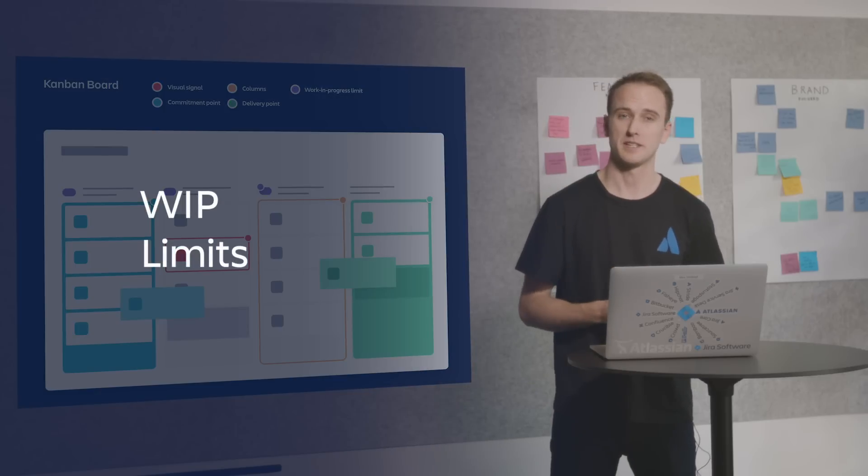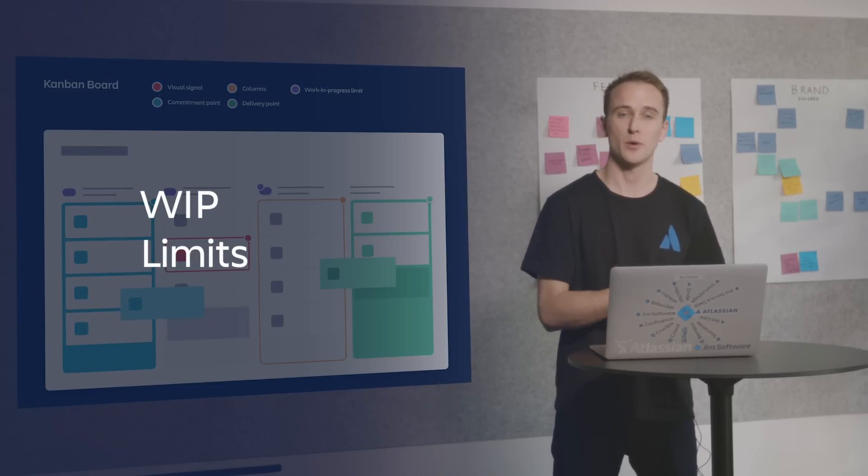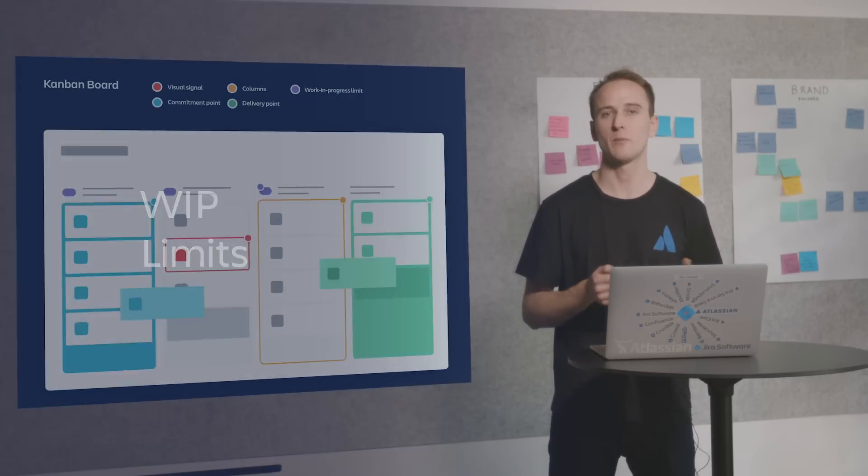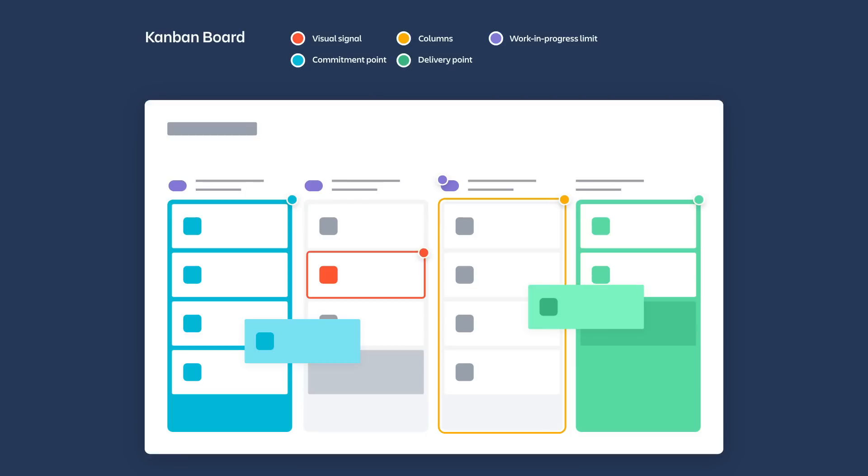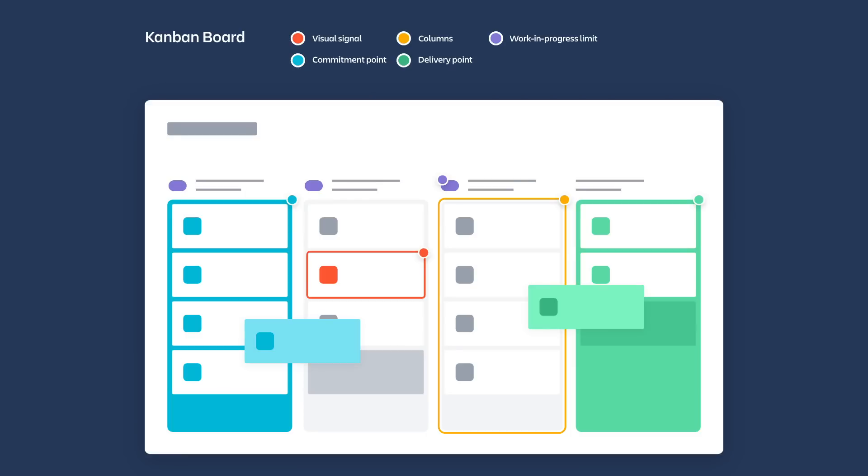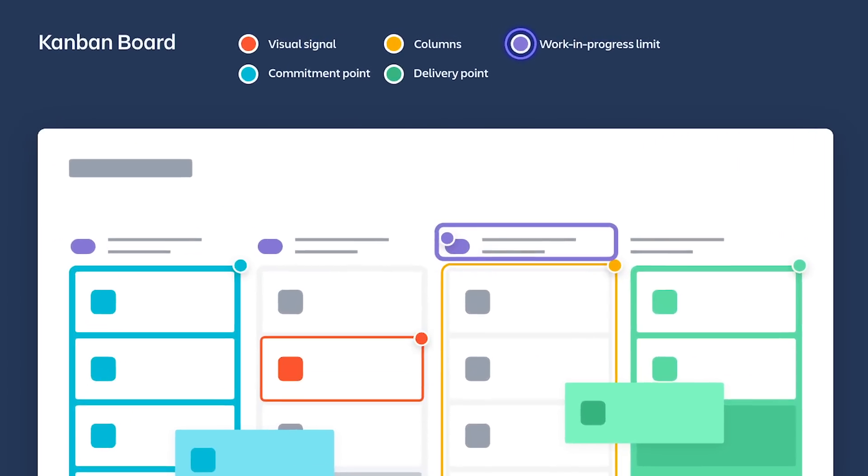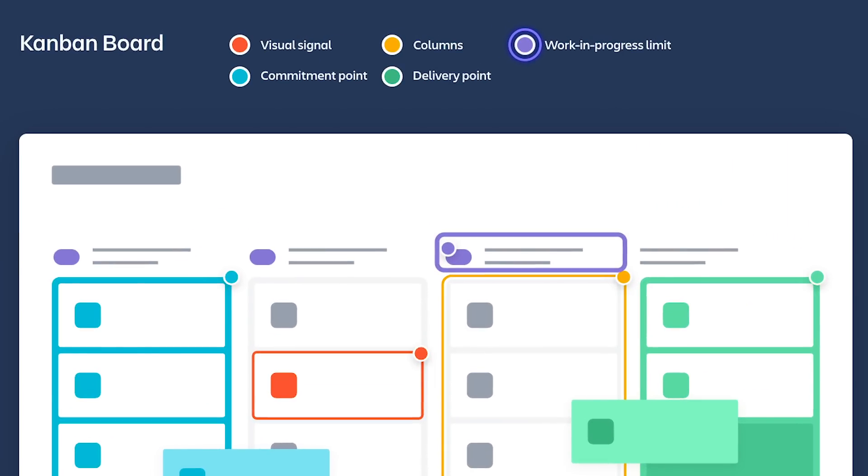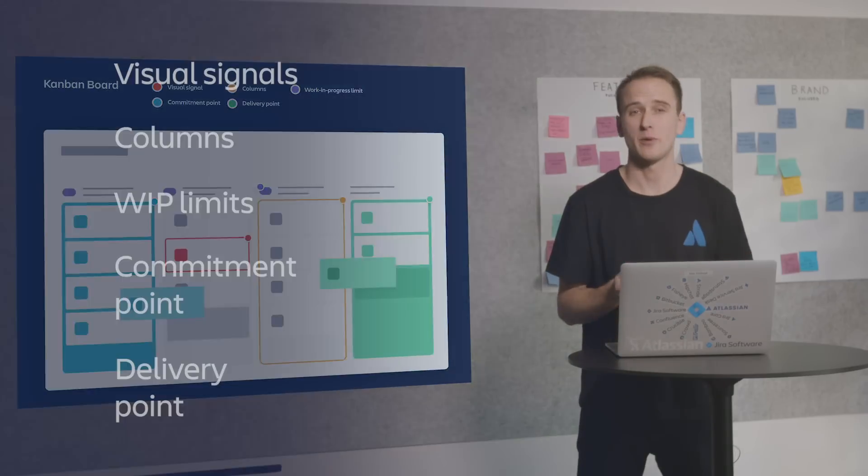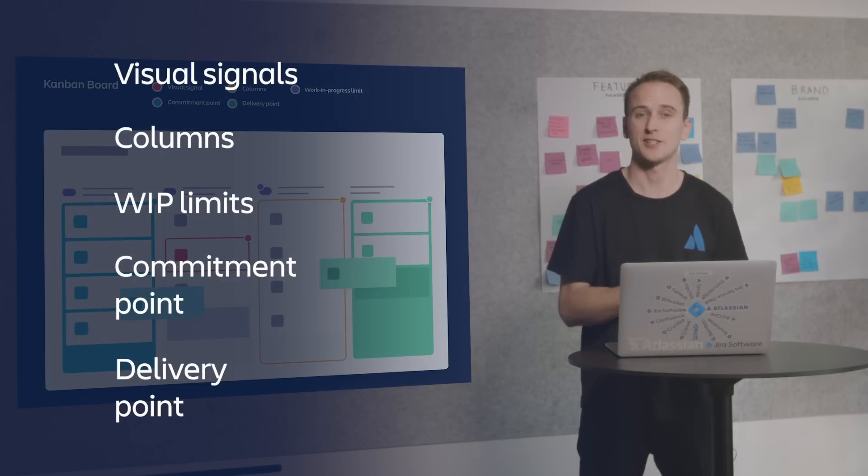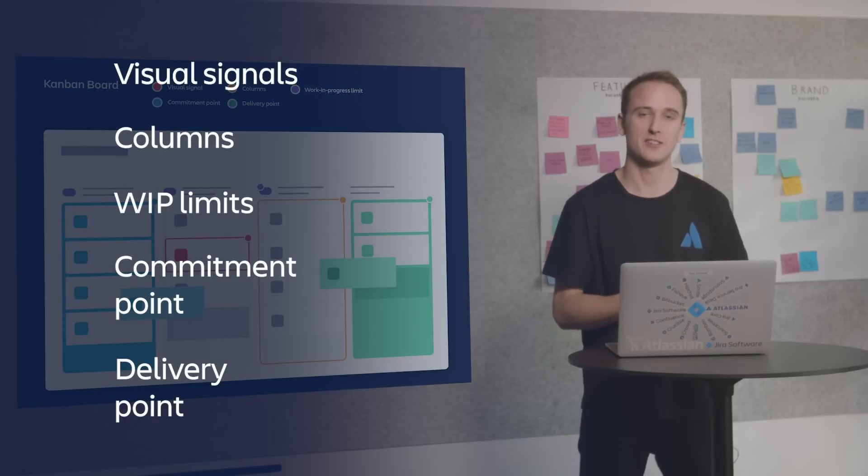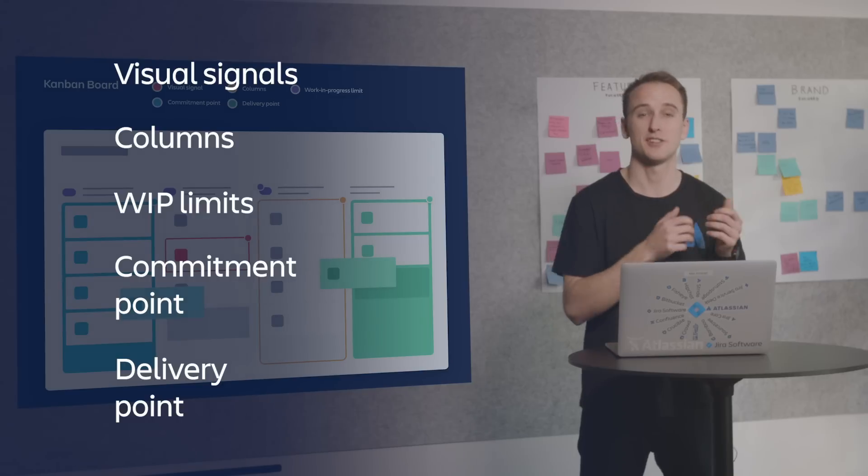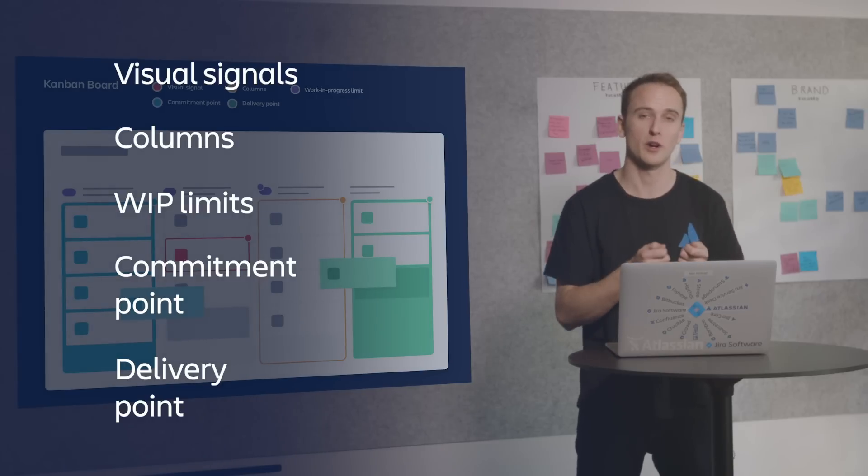Lastly, WIP limits. WIP, or work in progress limits, are simple mechanisms to limit the number of cards in any one column at any one time. Kanban teams find that by limiting work in progress, they actually move projects through the board in a more timely manner. Those five components, as described by David Anderson, are more than enough to manage the flow of work with a Kanban board.